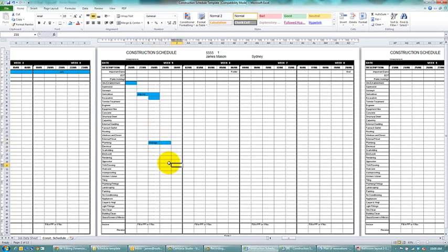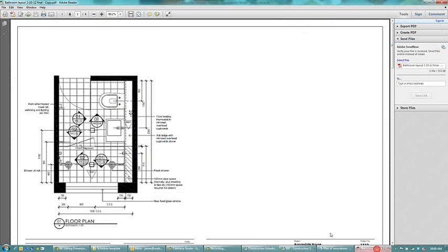And then the next thing after the drainage goes in, we're going to want to concrete that floor. So we'll come back up and find the concreter, and we'll put a day in there for the concrete to go in. Alright, now after that concrete's gone in, everything's been stripped out, we've got a shell of a room. We're going to need the carpenter to come in and frame up for some of this shelving that's going to be needed in through there.